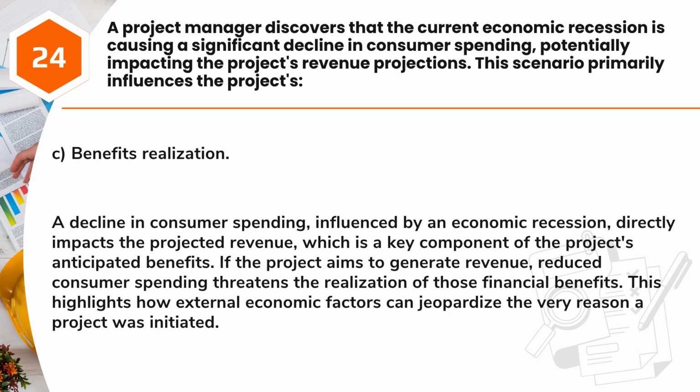Answer: C. Benefits realization. A decline in consumer spending, influenced by an economic recession, directly impacts the projected revenue, which is a key component of the project's anticipated benefits. If the project aims to generate revenue, reduced consumer spending threatens the realization of those financial benefits. This highlights how external economic factors can jeopardize the very reason a project was initiated.